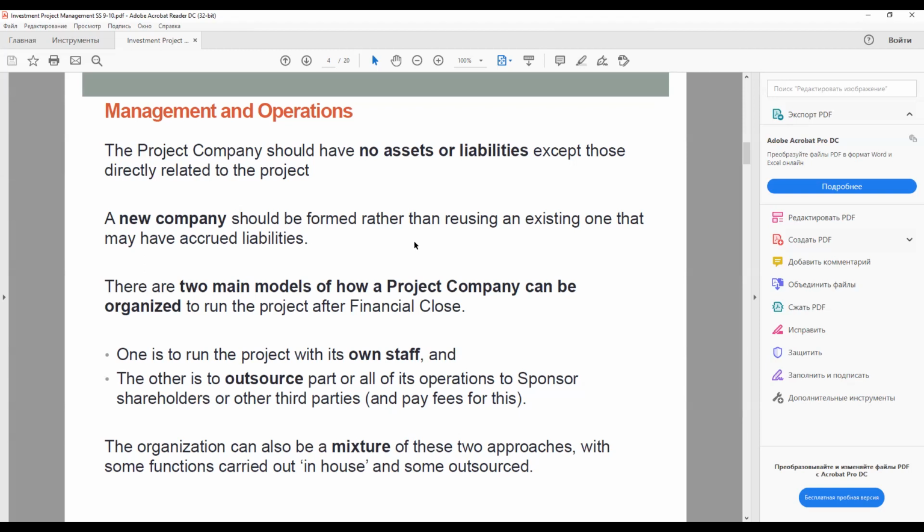The new project company needs to have systems in place with personnel who have an immediate grasp of the complex requirements of the finance documentation, not just in relation to drawing and spending the money provided under these arrangements, but also to deal with matters such as the lenders' reporting requirements. If the project company intends to use its own staff to operate the project, lenders may naturally wish to be satisfied that the personnel involved have the required experience. Although operating personnel do not have to begin work until the construction process is complete, key personnel have to be in place at the beginning of construction.